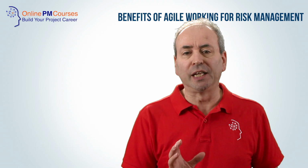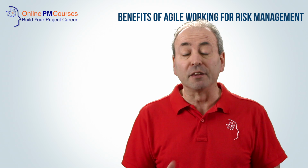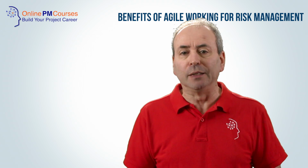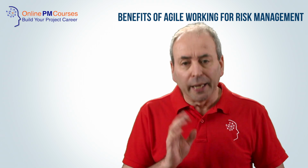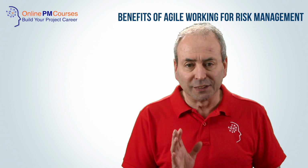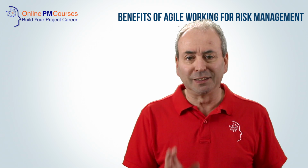Finally, the use of stable teams in Agile Project Management, small teams working together for a long period of time, iteration after iteration, means the team gets better at its processes. In particular, it gets better at estimating cost and schedule. This reduces budget and schedule risk.